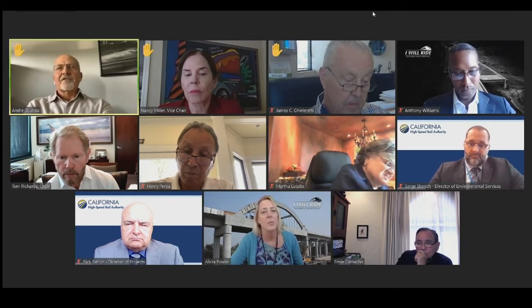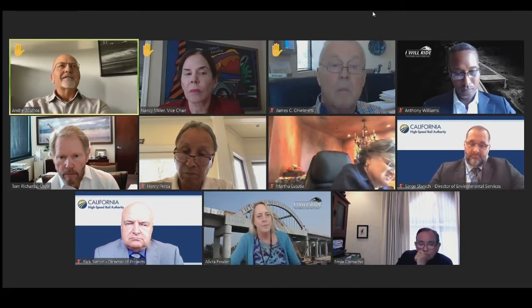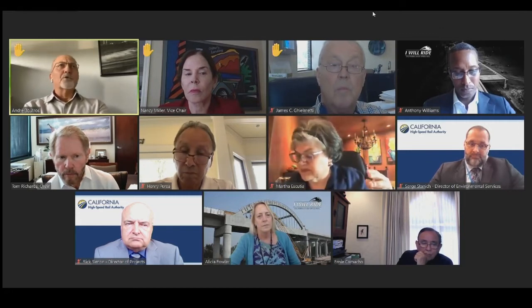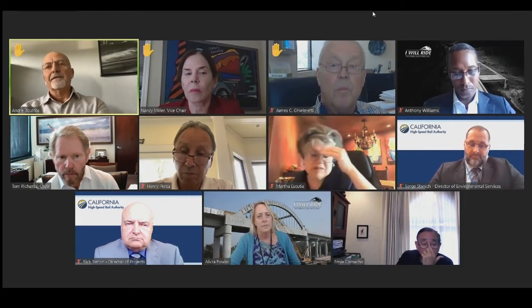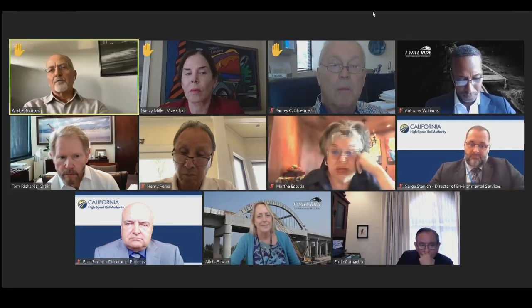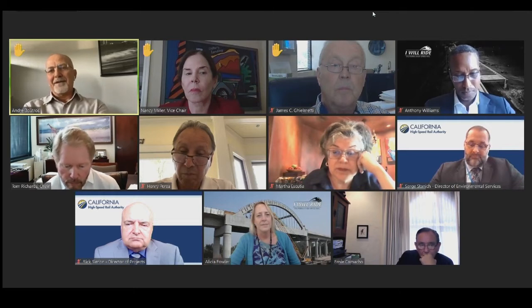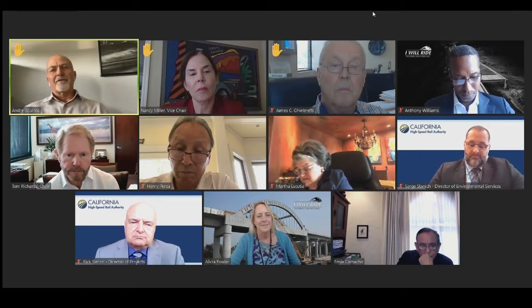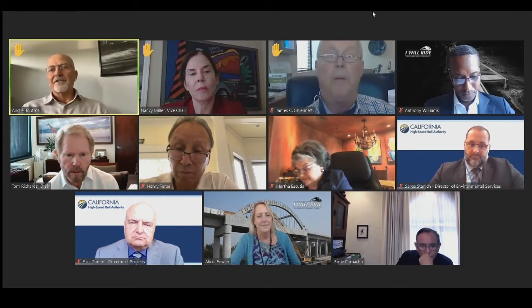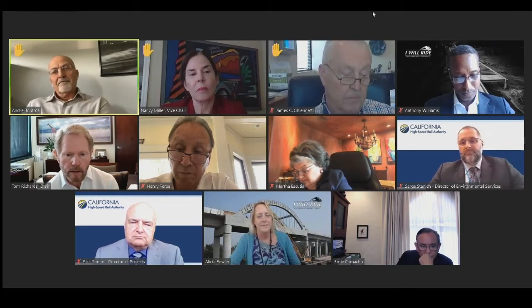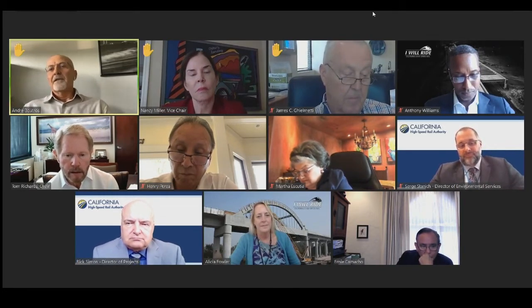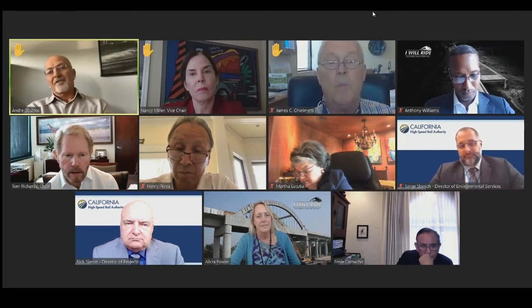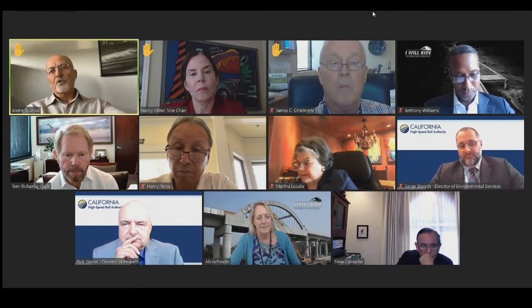And so it's not negotiate. I'm not really asking you to develop an MOU. I think there should be some sort of an agreement, at least verbal or otherwise, in terms of are they okay with it or are they not okay with it. It definitely impacts your location of your alignment. So you can't just go out and say, I'm going to put it here, period. There has to be some sort of a resolution, even in the preliminary stages, to see whether there are concerns, fatal flaws, things that we can work out. And ultimately, yes, once you go into the design process, then you can resolve those and develop your MOU and your contract to move forward with the construction. But,